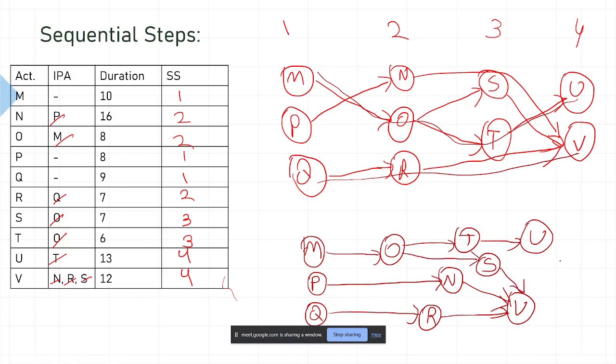It's a starting node and ending node. So from U starting and V we need to create an ending node, I suppose. Yes, sir. And a starting node also we have to create. Yeah, it doesn't look very nice if there are three starting points. So I will add a project start here, and similarly a project finish here. Does this seem okay? Yes, it's fine, sir.